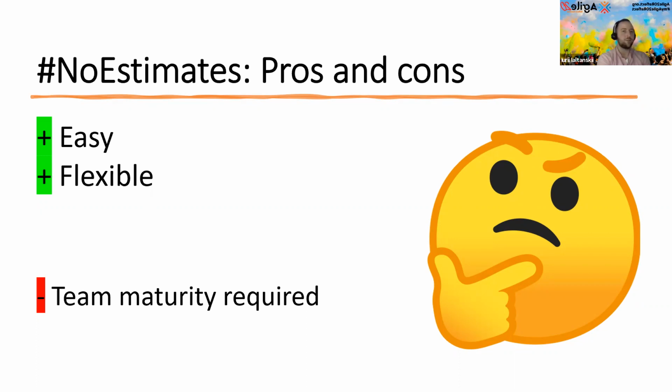So it's not necessarily some internal team metrics, like velocity, or any technical-related metrics like technical debt or amount of defects and so on, but it could be metrics like customer satisfaction, how frequently the product is used, amount of clicks done, when the new functionality has been delivered into production environment, and so on.